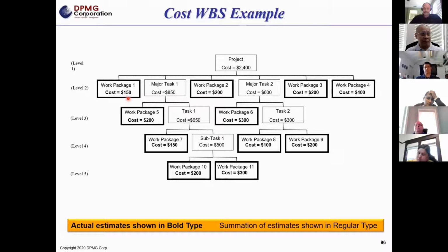Got that? Okay. So you basically go back, take the effort hours, multiply it times your, quote unquote, let's just say an average company hourly rate, and then you're going to roll that up.